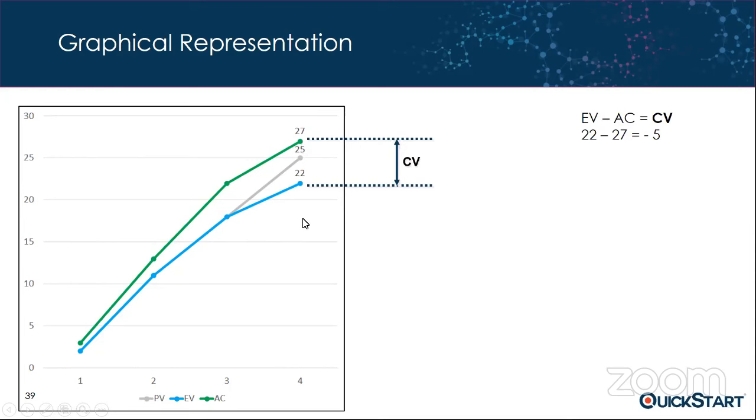So in this view, you can see your plan value, which was your original baseline plan, your actual cost for your project so far, as well as your earned value. And this is what you've actually delivered. Basically, what we've actually completed on that pipeline up to date in terms of dollars.